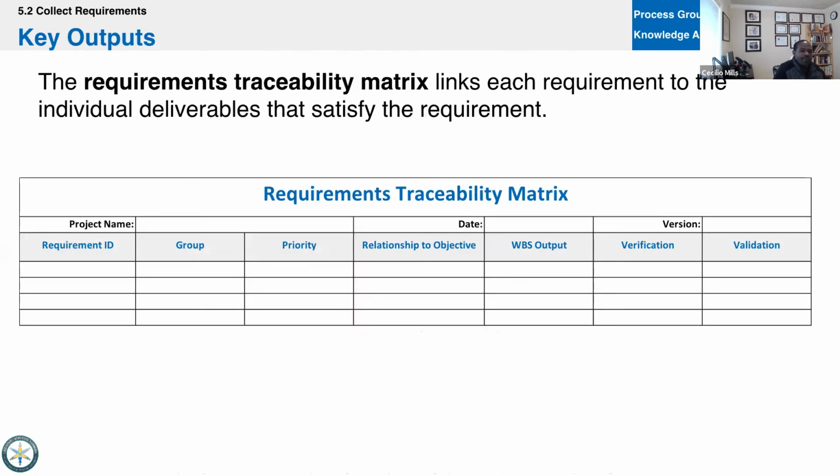All right, here's the traceability matrix, and you mentioned that. Many times, if you have a requirements list, you may just save that and make a new file, because it's using an Excel spreadsheet, unless you have some software like JAMA that does it for you. You'll then go back and add, in your traceability matrix, it usually ties to trace a requirement back to the owner or some sort of acceptance or test criteria. We will also trace it back to a business case. So on the exam, those are the three that are typically called out.